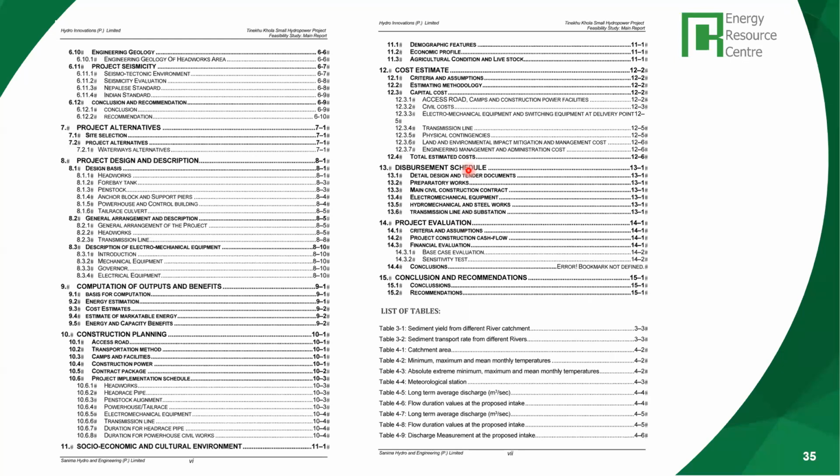Then, because you do a financial planning, you have to have that. Then finally, you do a project evaluation, where you calculate the cash flow, the financial rate of returns, the internal rate of returns, and to check the financial viability.